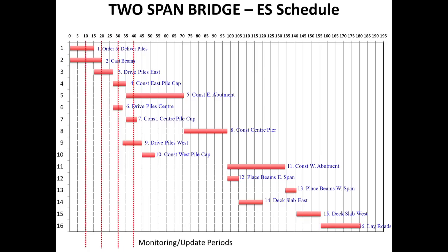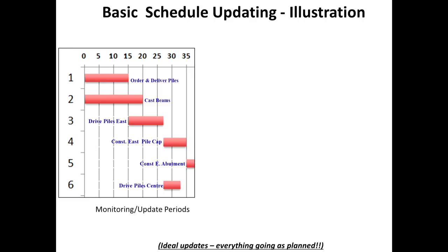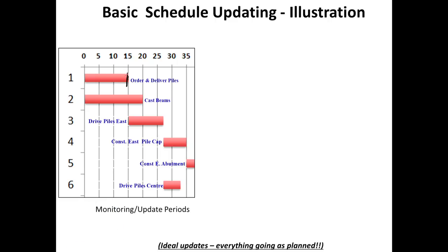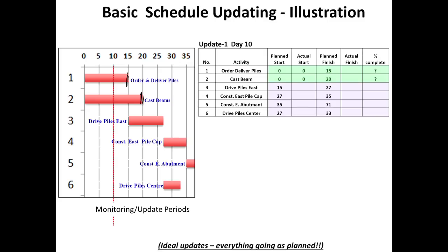We are taking a monitoring update period of every 10 days. What I am going to go forward with is this set of activities that I have circled, mostly for illustration purposes. Here I have got about 35 days of activities zoomed in. We have 6 activities listed: order and deliver piles, cast beams, drive piles east, east pile cap, east abutments, and center piles. You can see the planned early start schedule for each, going from 0 to 15, 0 to 20, and so on. Now, if we wanted to update the schedule, remember my monitoring is on every 10 days.